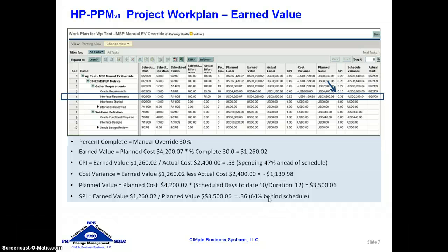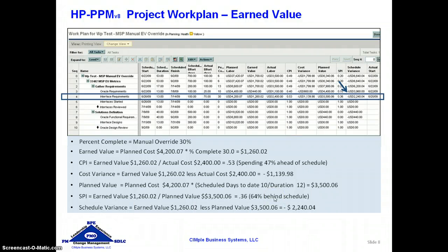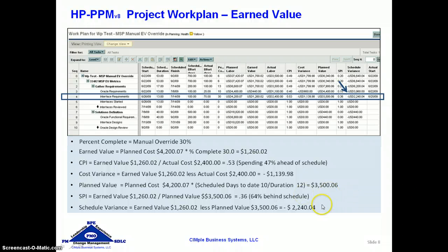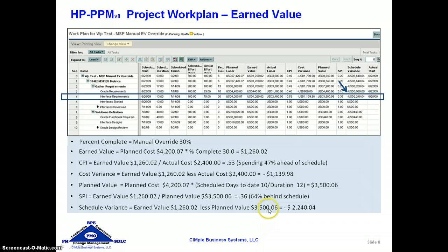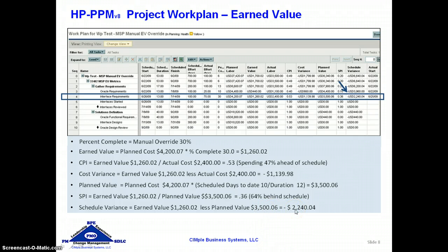There are scheduling and planning considerations that would make these numbers more or less useful depending on how the task is actually constructed. The last piece is the schedule variance, and like the cost variance, this is an attempt to monetize your variance to see the cost impact. It is the earned value less the planned value of $3,500, which says we are behind spending by $2,240.